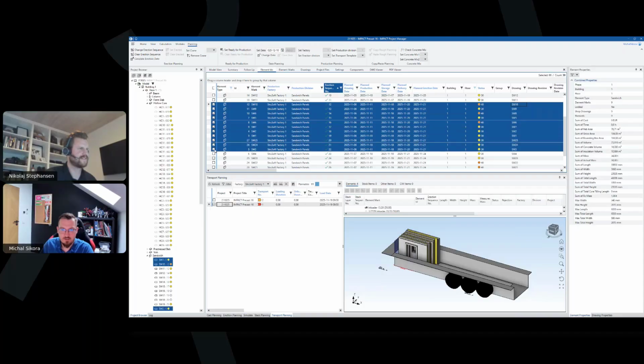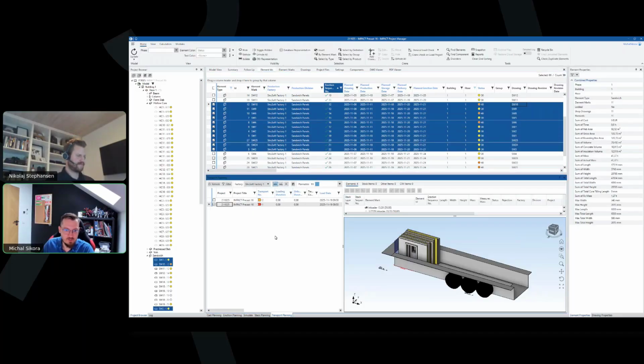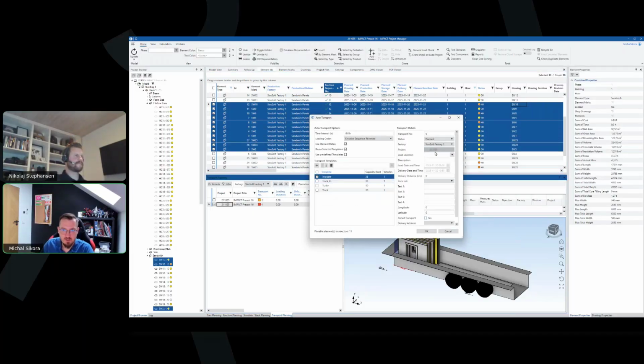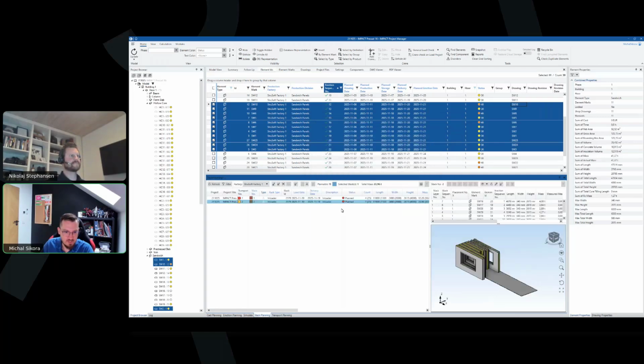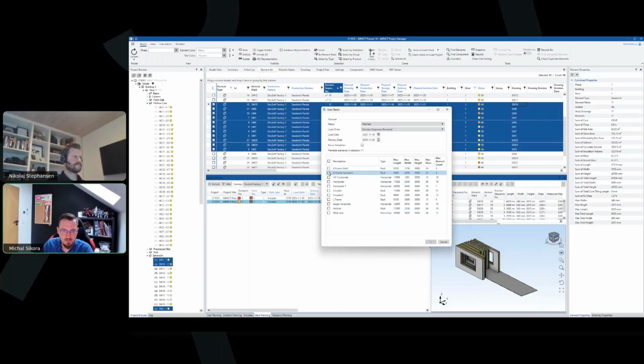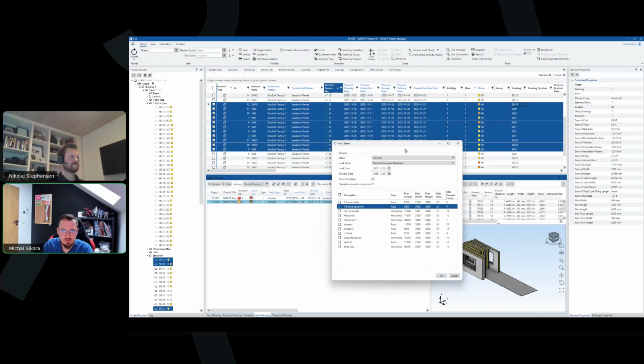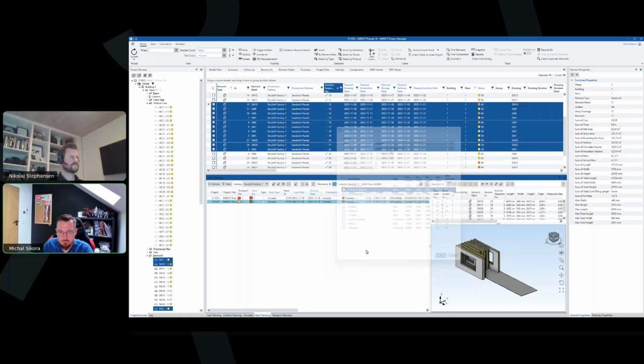That's okay. Let's plan out very quickly transports for A-frames. Let's not do it this way. Let's go to stack planning and create auto stacks, A-frame auto stacks for sandwich panels. You can see we have a template exactly for that, A-frame sandwich. It has a max element count and max mass, of course, so maybe it won't even fit 4 elements if they're heavy. So I'm just going to click that. Load dates, is that a good one? Yes, that's a good one.